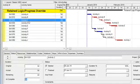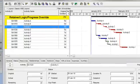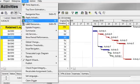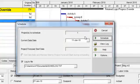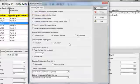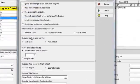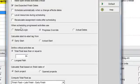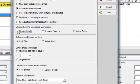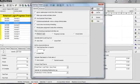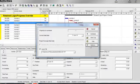I'm going to the Tools Schedule dialog box and I'm going to click Options. This is where you identify what your preferred method is for scheduling progressed activities. We're going to start with an example of retained logic. So I'll select Retained logic and close. And I'm going to change my data date to January 28th.